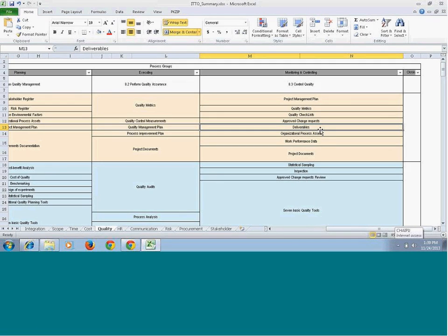So you remember the deliverables you are creating in the integration management knowledge area, in the execution process group. This deliverable must be quality assured before it goes to scope management, where your customer will actually perform validate scope, and they will accept it. If that fails there, that is a non-conformity and an external failure, and there's a huge cost involved. So you must first meet your quality standard so that it does not fail when the customer is validating the scope. So this deliverable comes here to monitor the quality of it.